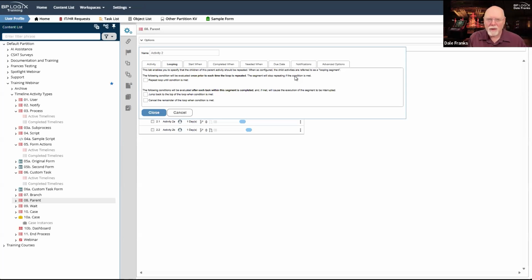So, there might be 4 or 5 different sections of the timeline, some of which are kind of independent of others. Others have internal dependencies, right? I can't really give you a computer until facilities has given you a desk. And so there are some weird dependencies that go along inside there.